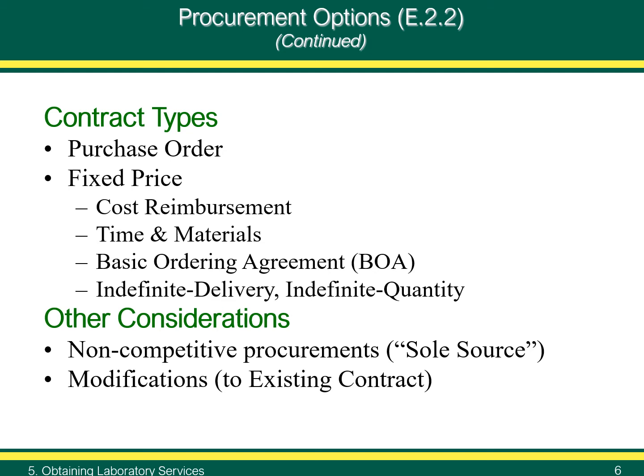Modifications to existing contracts may require sole source justification, especially if there's a change to the scope or quantity or the statement of work.